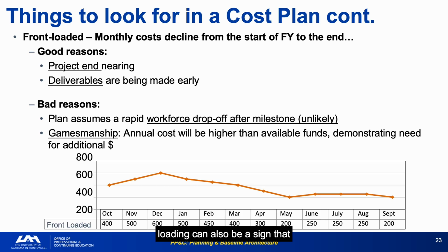Front-loading can also be a sign that a contractor is trying to get paid before anticipated problems surface. Programs approaching a difficult test campaign or a major integration event are more likely to experience contractor cost pressure in the preceding months.